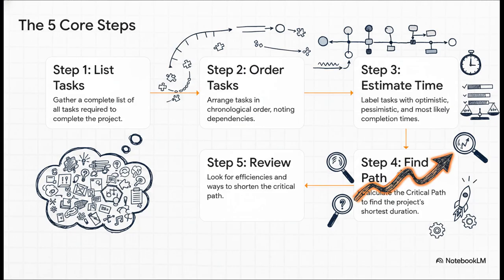Step 1, just brain dump every single task you can think of. Step 2, put them in order and figure out what depends on what. Step 3 is where we get real about timing. We'll touch on that in just a sec.